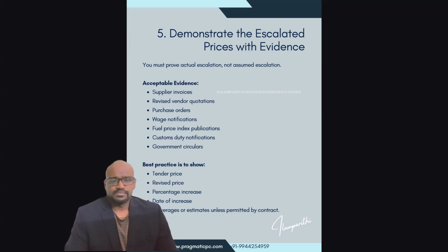Revised vendor quotations, where the initial quotation was very low and the new quotation is abnormally high. Purchase orders, wage notifications, fuel price indices, especially from government authorities, customs duty notifications, government circulars or price indices, as every year they release new price indices. The best practice is to show the tender price, the revised price, what the percentage increase is, and what the date of increase is. Avoid averages or estimates unless permitted by the contract.